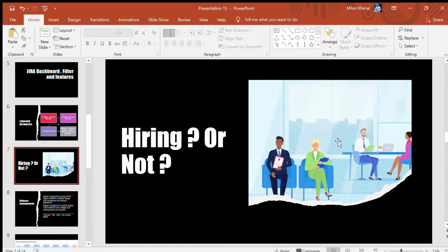So if we have some developers who know the code base, who can learn the code base really soon and are with the same stack, we can replace the developer from our internal team and give that task to them. In that situation, if the project deadline is really near, we don't think of the option to hire a new developer, because a new developer will take about 1 month to settle down with all the requirements, and we don't have that much time to hold on to the project.